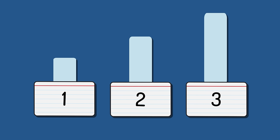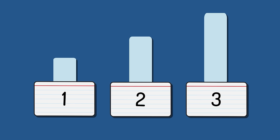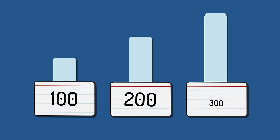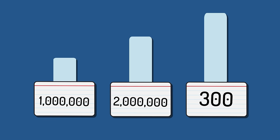Instead of assigning 1, 2, and 3, a team could instead have assigned 100, 200, and 300 — or 1 million, 2 million, and 3 million. It is the ratios that matter, not the actual numbers.